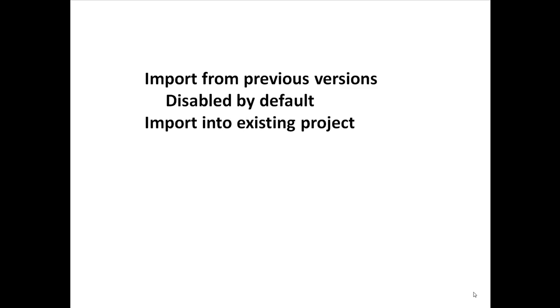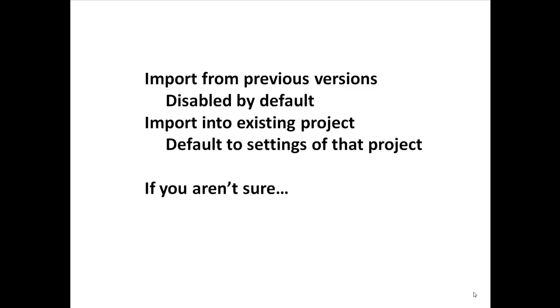There are other circumstances for default settings. When you import projects from previous versions of Core, versioning will be disabled by default. When importing into an existing Core 6 project, versioning will default to the settings of that project. If you aren't sure, remember that you can always go to the Administrative Tools to view and change the current settings.